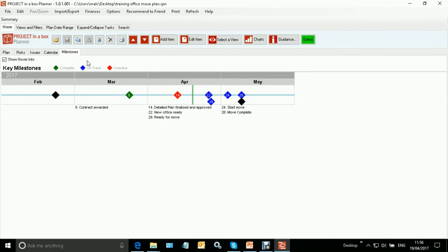Coming to the milestone chart, this is again a simplification of the display of the project, finding that people are using these in their reports more and more. Often that they've been drawn by hand, in PowerPoint or something. So this is creating one for you, and what it's doing is it's identifying the date range of the project in months. It's finding the date the project starts and the date it finishes, which you get automatically as black milestones, and then it's finding any other milestones present in the plan, and it's dropping them onto the appropriate place on the timeline. We've got today's date, and then it's showing an icon for that milestone based on its percentage complete.